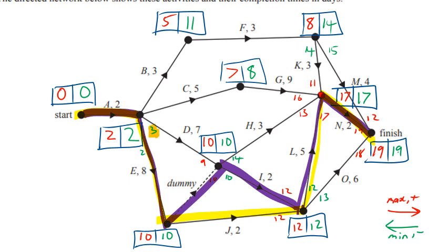As soon as you get these triangles forming like this, you can have some problems. But you can see there's actually a float on activity D, which is hidden by this technique. It's very, very annoying, but you don't use activity D. You've got to include on these things the critical ones that don't have any float. And activity D does have a float. You can see it's got a float of 1 because there's a difference between the 3 and the 2 there.